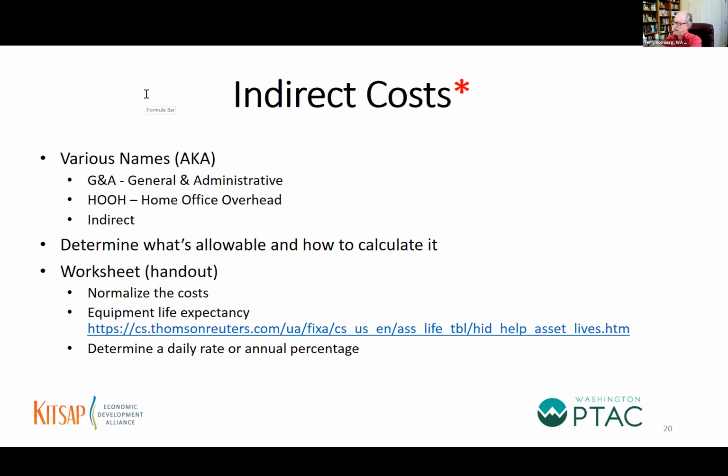So you take that and divide it by your indirect cost pool of $103,000, and in this case, it comes out to 10.34%. So that is your indirect rate that you're going to put in your cost proposal under indirect. Remember, the one that I showed earlier in my example was 12.2%. Well, for your company, you do this computation. If it comes out to 10.34%, that's what you're putting in your cost proposal for indirect costs.